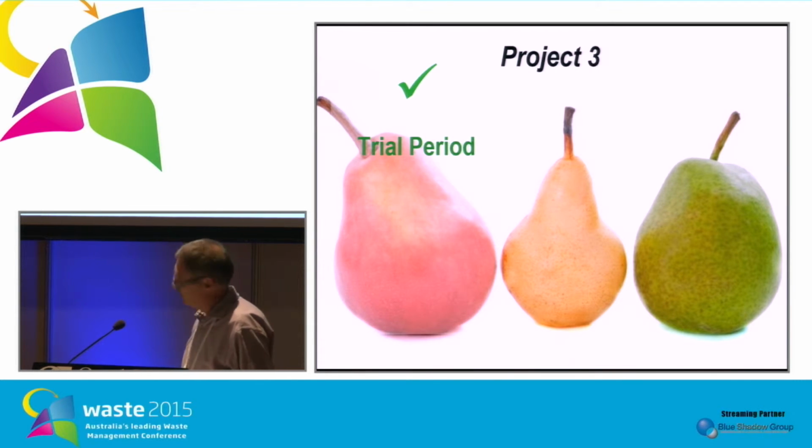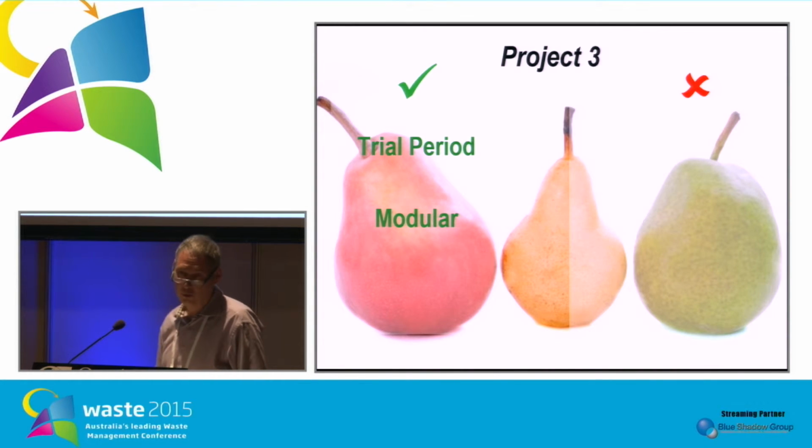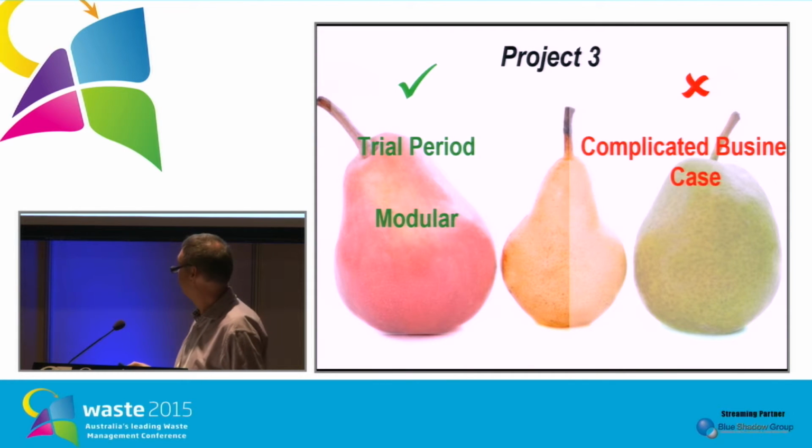And this one here, the positives in this one is that they set up the facility and they actually had a trial period. So they set it up to operate for a year. It actually went for about 2 or 3 years before they reviewed it. But at least they had a process to actually checks and balances before they invested more money in it. They also had a modular facility, so they installed something that could actually had capacity to provide for a select area, and then the intention was to expand that. So they actually planned in advance, just in case things went wrong.